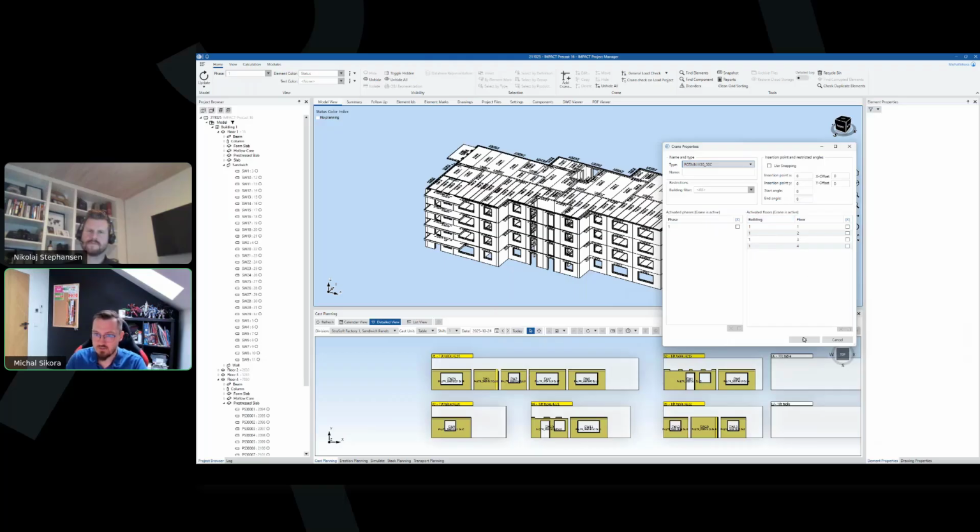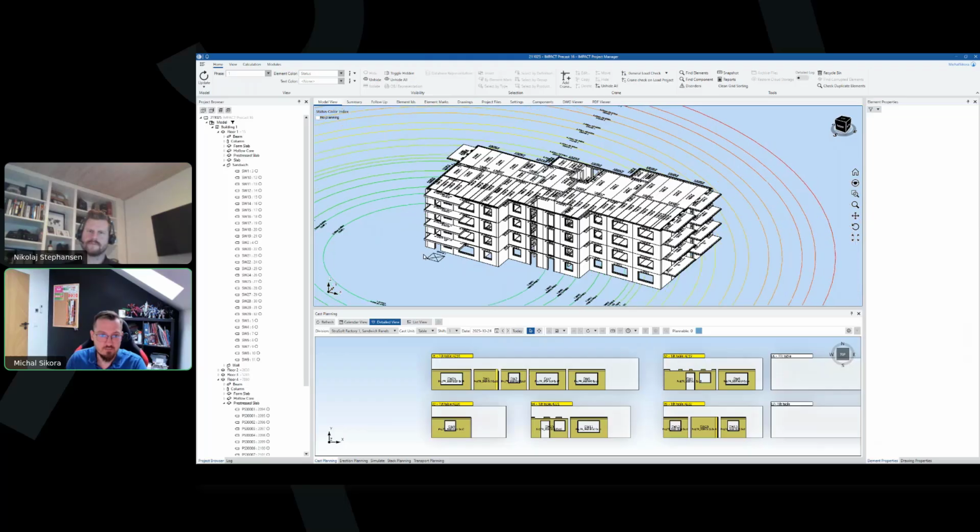And with that, I'll just go ahead and click OK. First, of course, put the name of the crane 1. Always forget to do that. And mark which phase the crane will be active on. So you can have different phases of construction. You can have multiple buildings as well, so you can separate that as well, which crane is available for each building. For bigger sites, of course, there can be more cranes than one. So let's go ahead and do that, and let's place our crane.